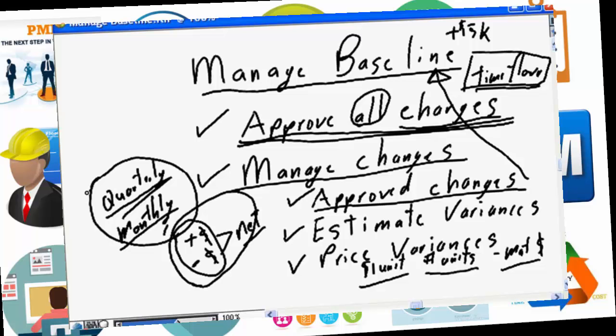Maybe changing the timeline again can help you give budget relief. Once you work with management, once you determine what the appropriate action is going to be to provide the budget relief, you then have an approved change to the project. You have worked with management, the sponsor, and you say, we're going to reduce functionality.